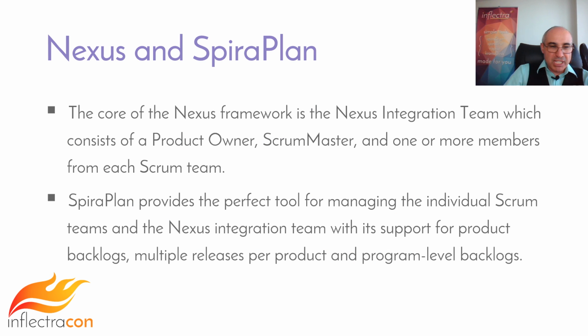So one of the key pieces that makes Nexus distinct from other methodologies is this Nexus integration team. And that consists of the product owner, the Scrum Master, and if you want, members of the other teams. So at the very least, each Scrum team will contribute their product owner and Scrum Master.